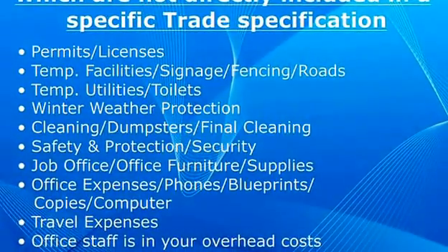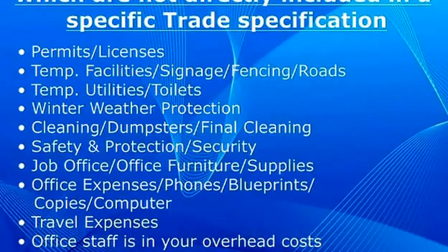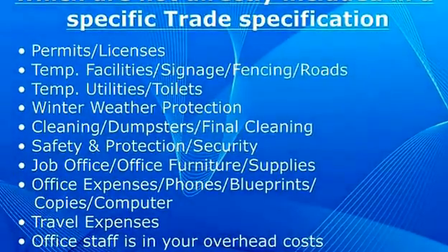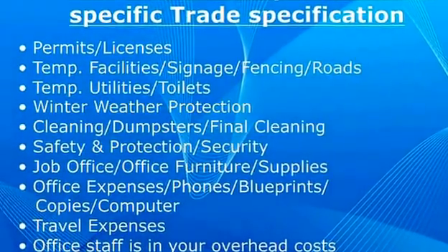Winter weather protection. This one here is one that on every job, I'll look at the guys along this wall, and we'll all think differently about winter weather. Because what do I include? You're building a building and you're starting in September. I'm going to be doing masonry through the winter. What do I have to do to build that masonry? Do I have to build a tent over the entire building and keep it heated to run my masonry? You know, we all laugh about that, but I've done it. I've built a tent over a building so that I could build it in the winter.